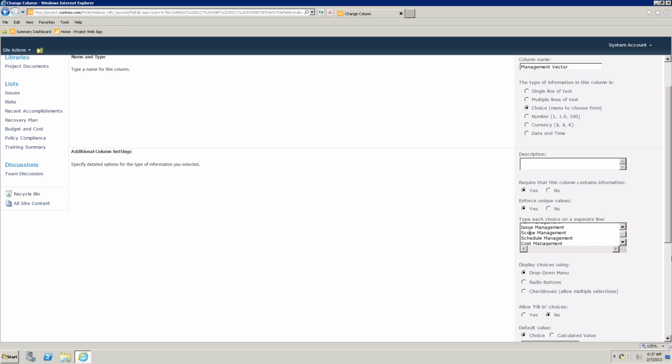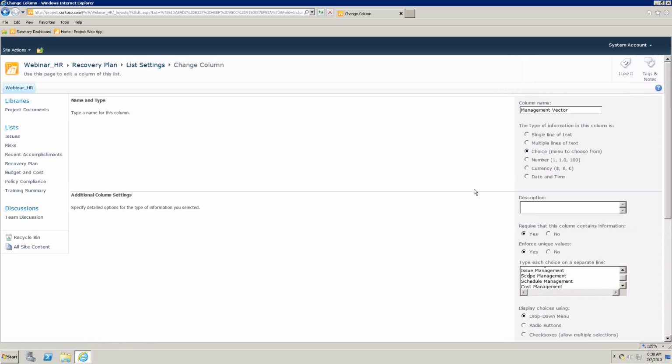I have to do a fancier kind of reporting if I want that, and we've done this recently, in fact, just in the past 6 weeks, where we had to pull content out of both the SharePoint reporting content database as well as the Project Server reporting database to create a consolidated project status report that had information about, say, schedule information, as well as risk information, as well as information from these custom lists. Okay, so it's a tricky thing. It's certainly possible. We did it using SQL Server Reporting Services. All right, best answer I can give you right now.